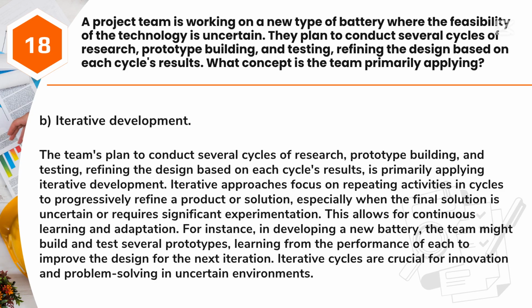Answer: B. Iterative development. The team's plan to conduct several cycles of research, prototype building, and testing, refining the design based on each cycle's results, is primarily applying iterative development. Iterative approaches focus on repeating activities in cycles to progressively refine a product or solution, especially when the final solution is uncertain or requires significant experimentation. This allows for continuous learning and adaptation.